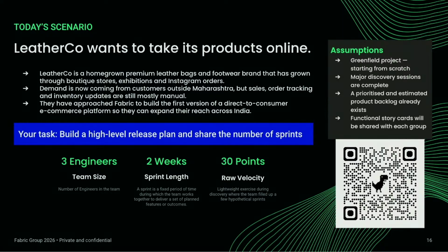But you all are taking about 4.5 sprints to do this work. Is this like parallelization of work? Maybe a bit of it. Because there were 15 points, we thought 5 points of work can come in this iteration, and then 10 can be done here, 5 can be carried out here. Okay, so that's how you all have split.